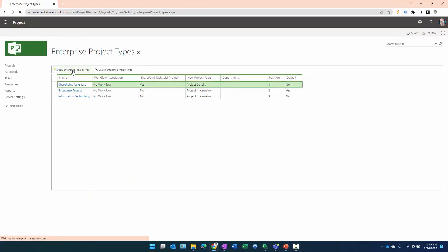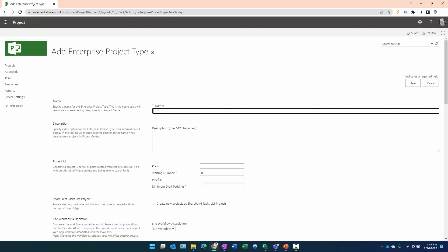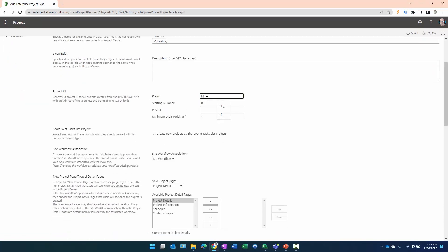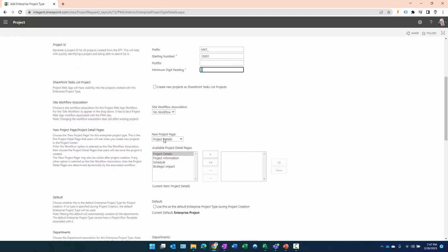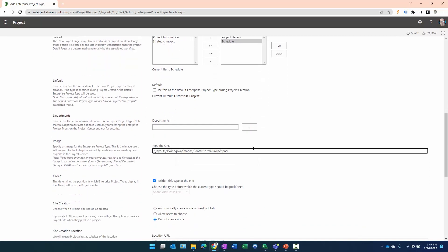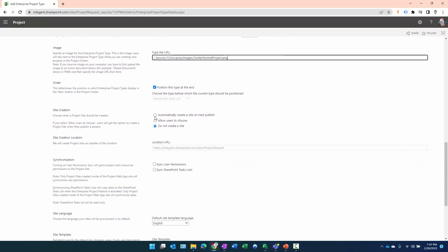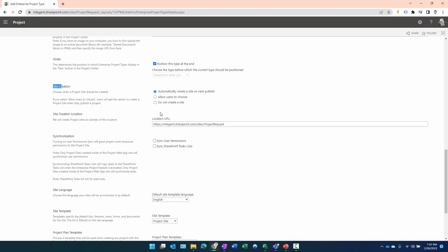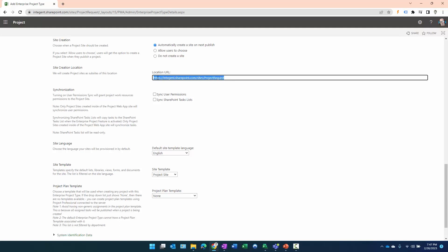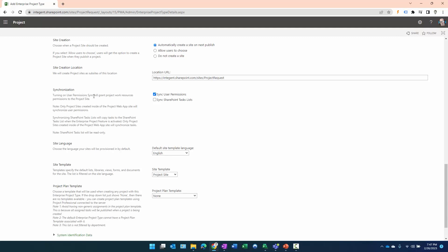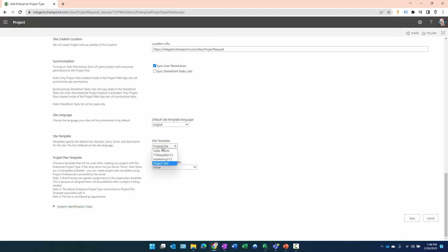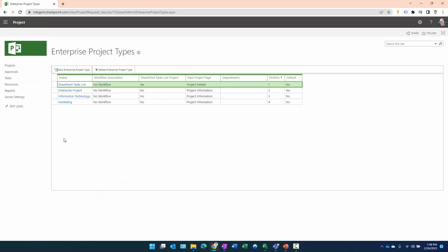That one's saved. Now let's create the marketing EPT. Click New Enterprise Project Type, enter 'Marketing', with a prefix of 'MKT_' for the ID, same first number, digit padding incrementing by one. The project information page will be the kickoff page. We'll add the Details and Schedule pages as before, paste in the URL, let it go to the end of the list, and set the project site to be created automatically. We want to sync permissions, select the 'Marketing v12' site template, and 'Marketing Research' as the project plan template. Click Save.